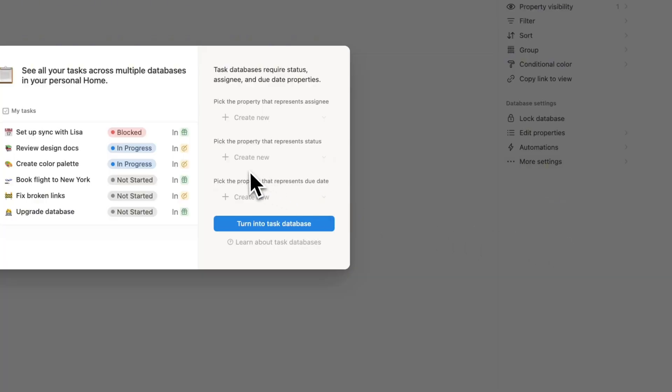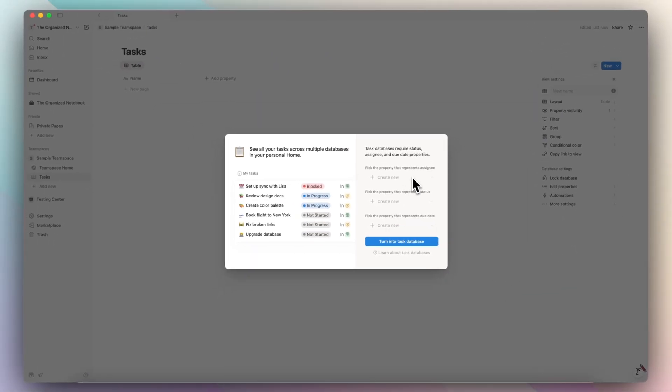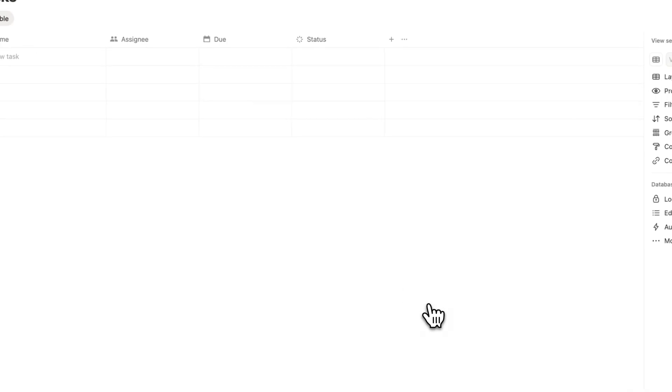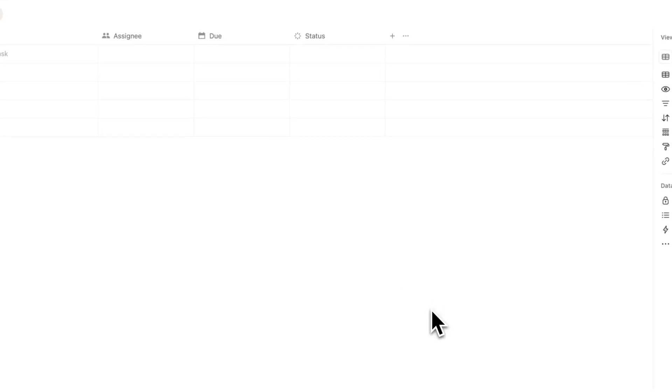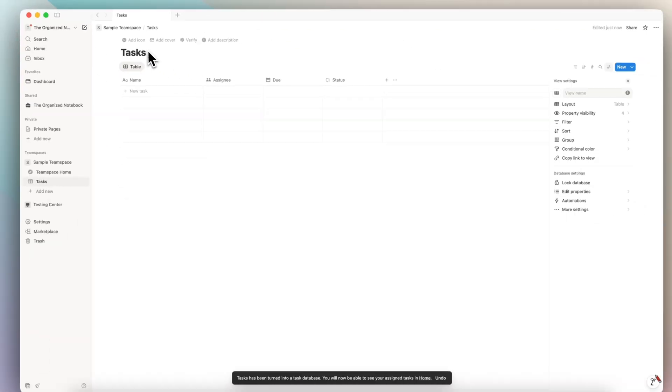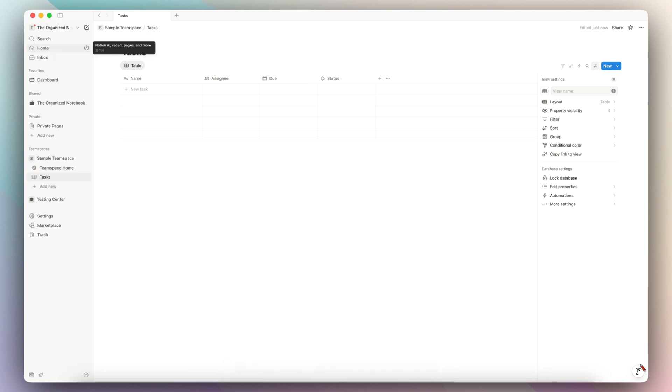For it to be a task type database, it's going to need an assignee, a status, and a due date. So I'm going to click turn into task database. One of the benefits of a task type database is also that it's going to show up in your home in the sidebar, and you can have a list of global tasks across your entire workspace.